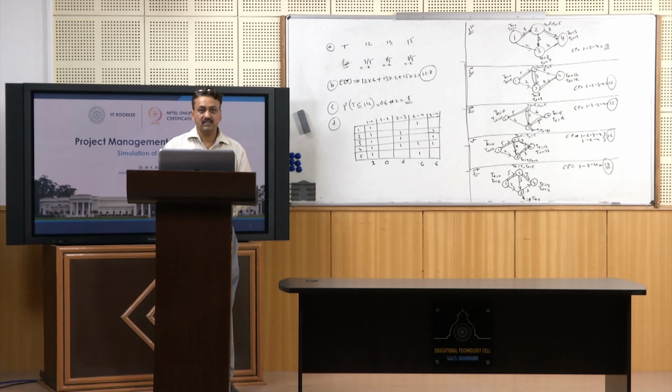So, it is very difficult to predict the duration of an activity. So, simulation is the best method. Why is simulation best? Because you can always prepare a computer program and simulate an activity thousands of times. In fact, if the duration of the activity is distributed, let us say, as a beta distribution, or a normal distribution, or some flat distribution, or triangular distribution, or some other distribution.